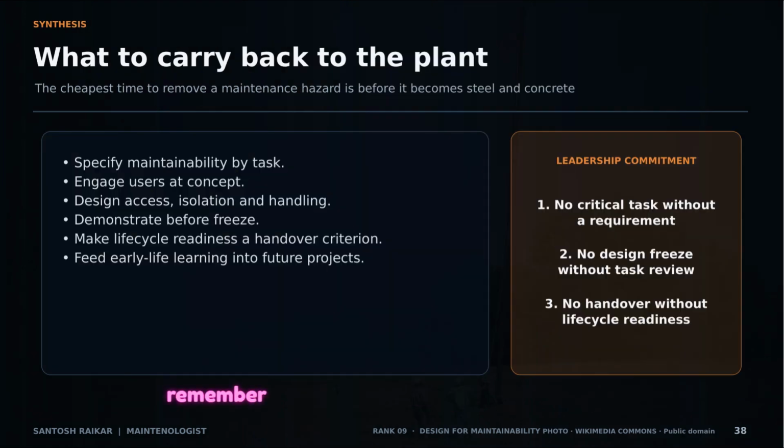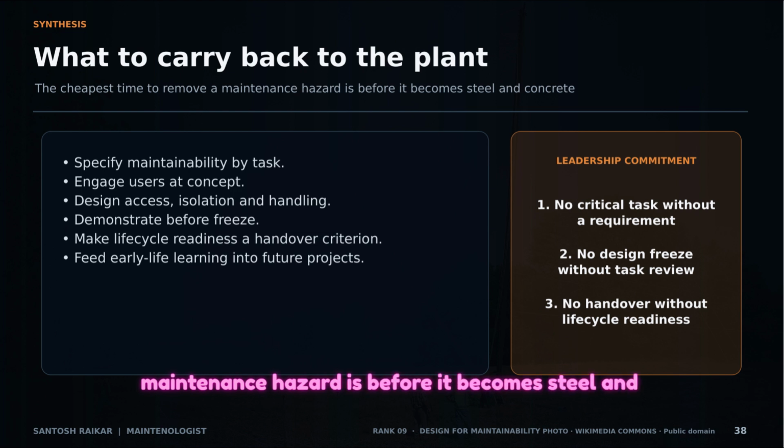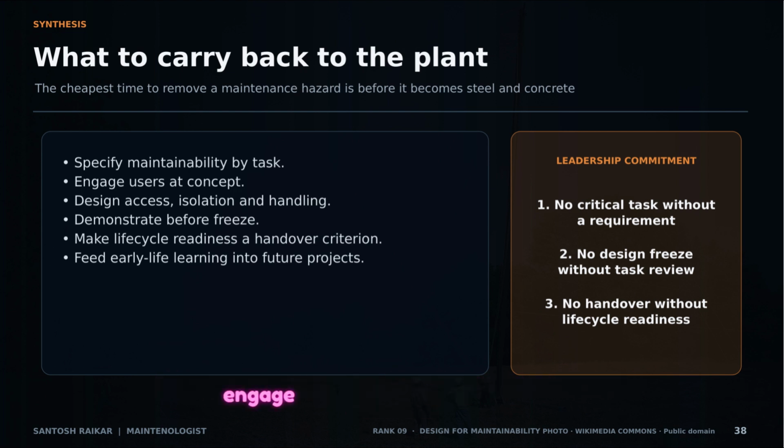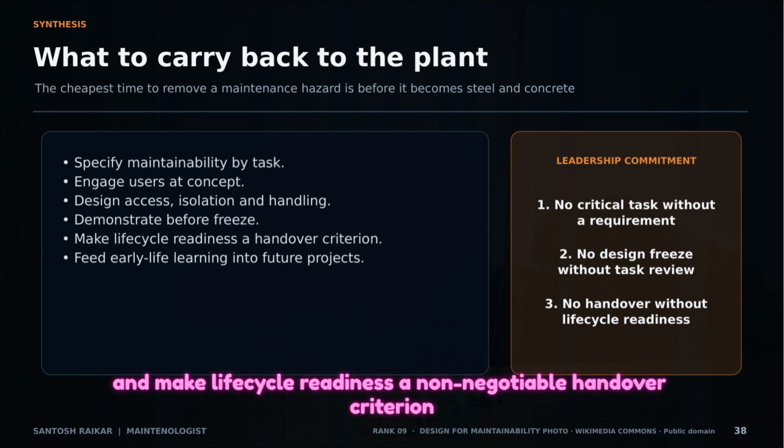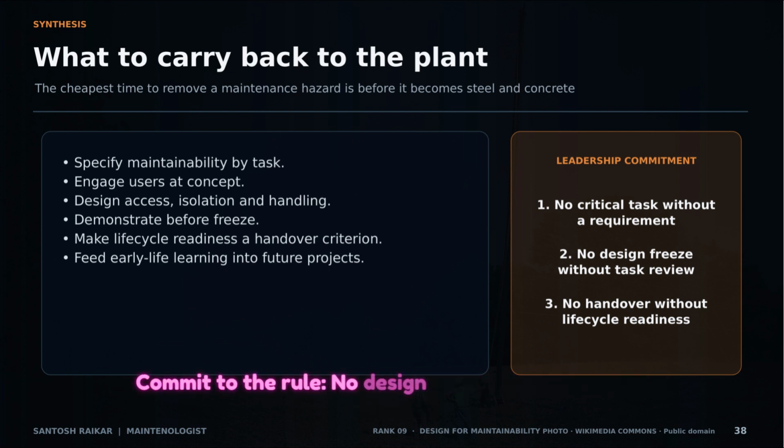As we wrap up, remember this. The cheapest time to remove a maintenance hazard is before it becomes steel and concrete. Specify by task, engage users at the concept stage, and make lifecycle readiness a non-negotiable handover criteria. Commit to the rule. No design freeze without a task review.